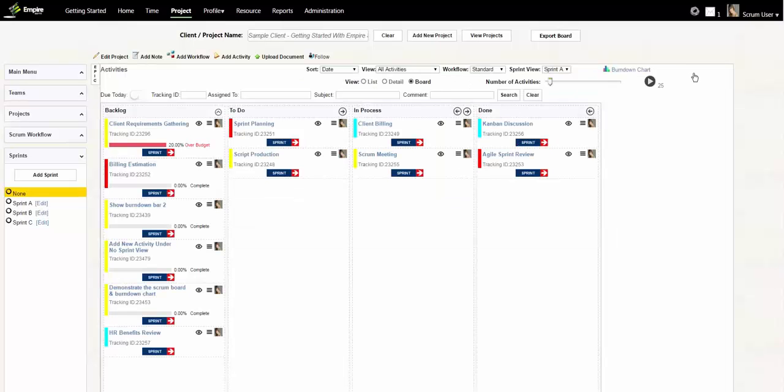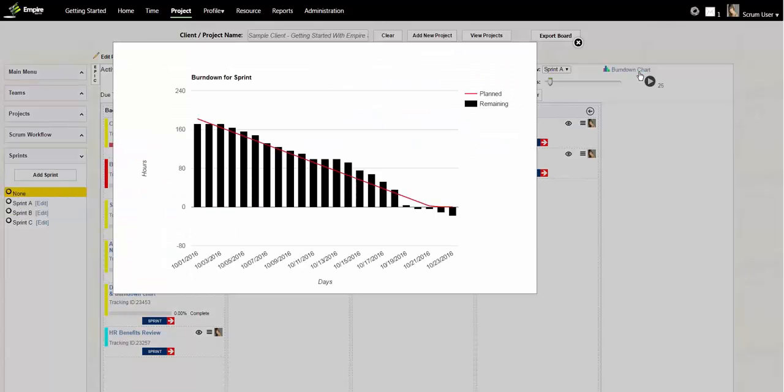To view the overall progress of your sprint, select the burn-down chart icon. A burn-down chart is a graphical representation of the work left to do versus time. The outstanding work, or backlog, is often on the vertical axis with time along the horizontal. That is, it is a run chart of outstanding work. It is useful for predicting when all the work will be completed in bar and line graph format. The y-axis shows the units of time, and the x-axis shows the daily period of the sprint.